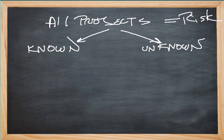Unknown risks, however, are those to be feared. That's a question mark. This usually means that they can't be easily managed in a proactive fashion. In this case, your plan may simply be a contingency plan.